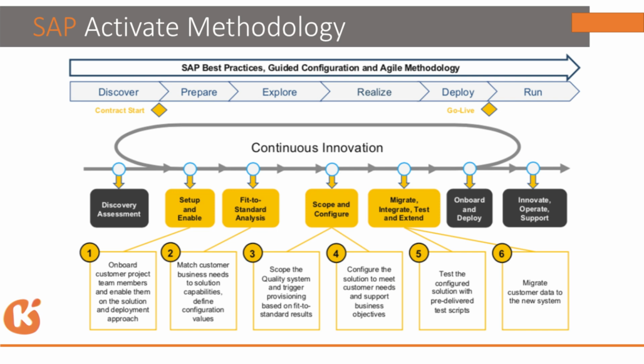Cutover activities is nothing but checking whether the system is ready for importing all data or not. So we need to check everything: all payroll areas are created, all locations, all wage types, all option types. We need to make sure of this in production, because once the configuration is moved to production, we need to import the data. If the configuration is not there in the production system, whatever data you import will not update. Best example, suppose one of the employees works in Hyderabad, there is a location called Hyderabad, but you have not yet created the Hyderabad location in the production system, meaning it did not move from development to quality, quality to production.